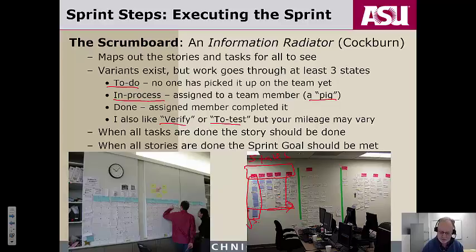And as you get the task done, and you get all the tasks done in a row, this one doesn't quite have it, but if you got all the tasks done in a row, then you wind up being all the way done with that user story, so you hope. In fact, I can't really see the headers on this one, but I would suspect what's really happening is that this work is moving from here to here to here, and the point is everything's got to push this way, so eventually you can drag the user story and call it done all the way over on that side.